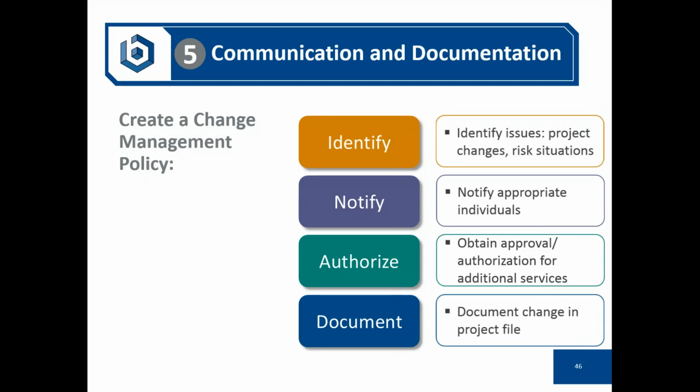So again, you want to document these changes in the project file. Again, for history, for auditing purposes, that needs to be there. So identify, notify, authorize, and document. Very, very important. This issue of being able to capture additional services is one of the most important aspects of trying to maintain profit on a project and enhance profit on a project.